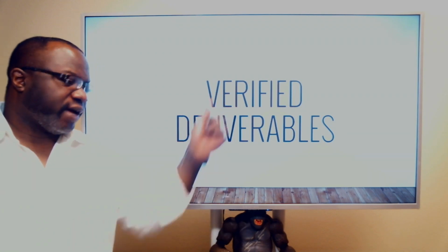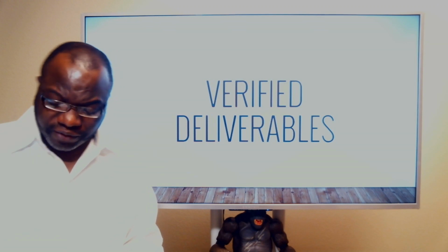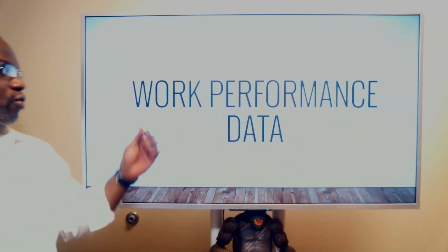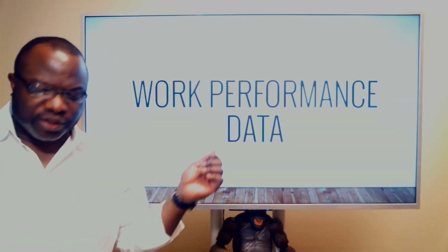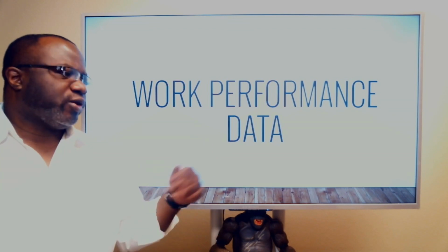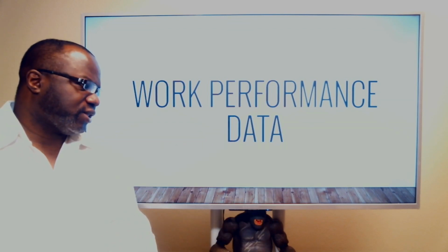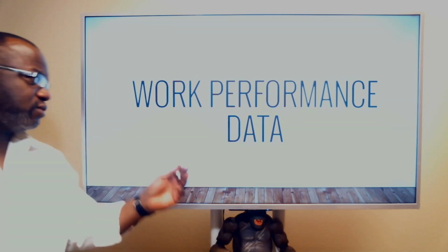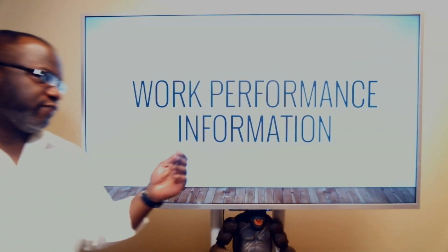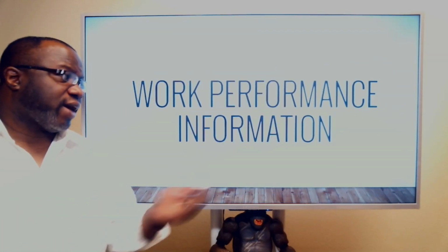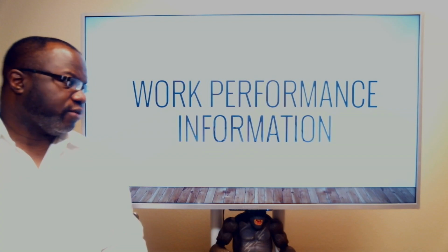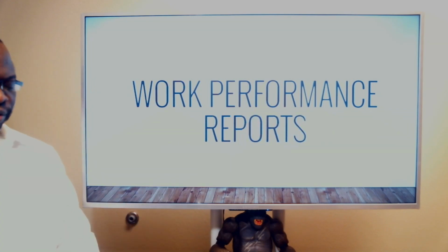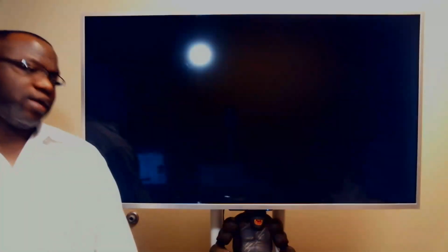It's verified if it is now found to be fit for use. Work performance data, raw observations that you make on your project that enable you to further analyze that data to glean information that becomes reports. Work performance information, the work performance data now analyzed becomes work performance information, and that gets put into a work performance report. And believe it or not, that's it, folks. Those are all of your inputs.